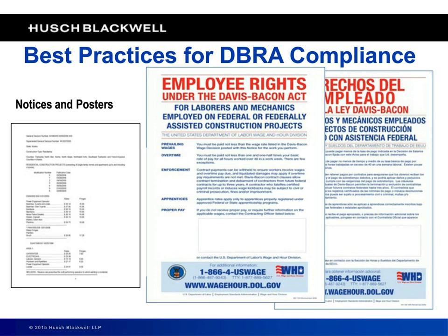Both of these items need to be posted someplace prominent. I think a job site trailer is prominent enough. And do yourself a favor: take a picture of these items posted in your job site trailer and keep a record of that.